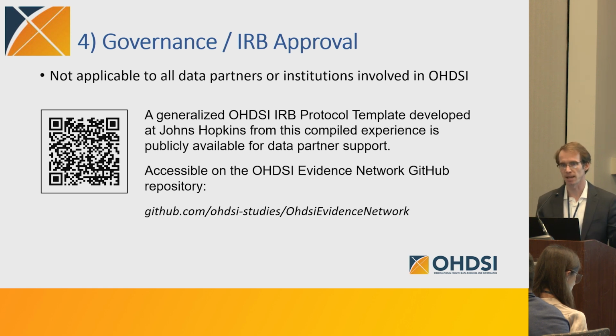Back in the day, getting data and running analyses took so long that this was not something that we needed to explicitly say, hey, go ahead and get this going. But now this is one of the rate limiting steps, because everything else is set up on rails such that the pace of the analysis is actually outpacing just getting approval to do the analysis. So go ahead and get the IRB ball rolling would be my advice.